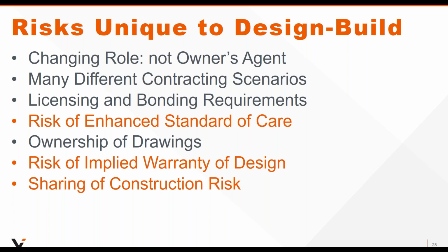That is not going to happen in a design build environment, especially in the most common scenario where you're a sub to the design builder. You're often restricted from communicating directly with the owner. And a lot of the documents will tell you that unless it's a public health, safety, welfare issue, you are restricted from communicating directly with the owner.